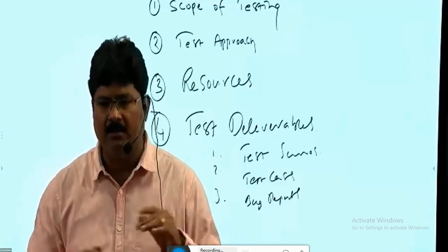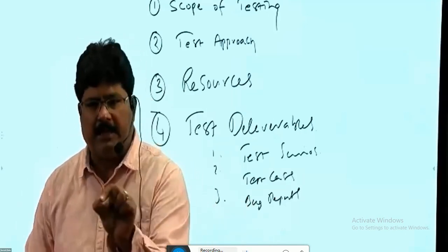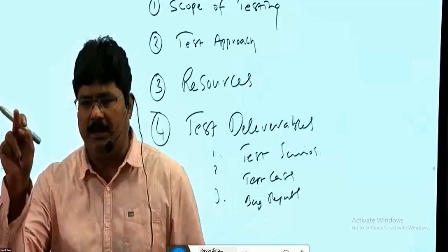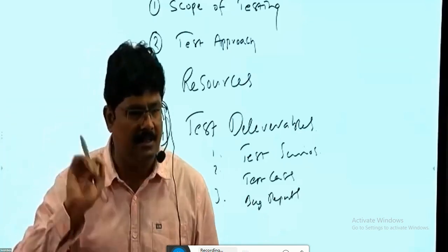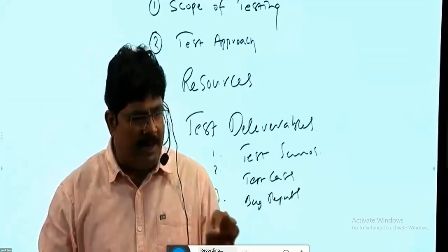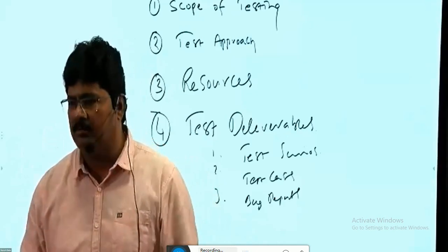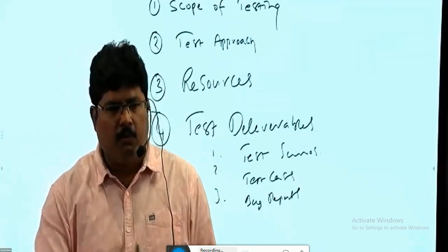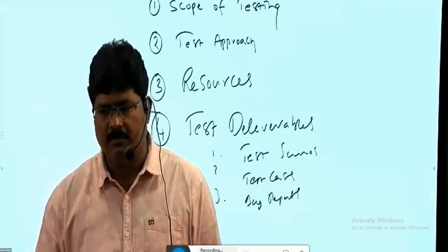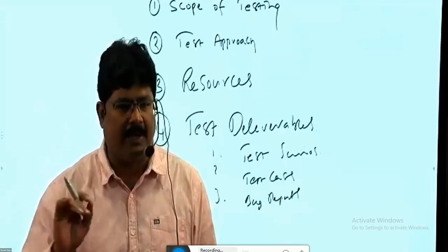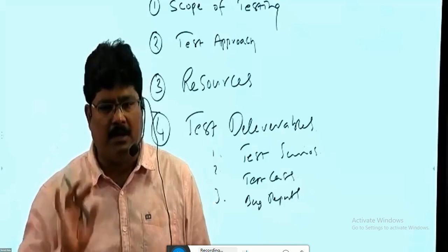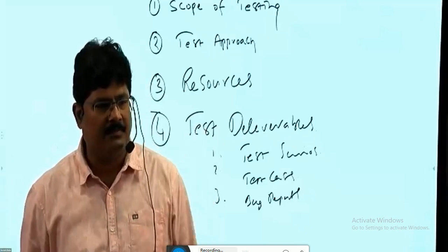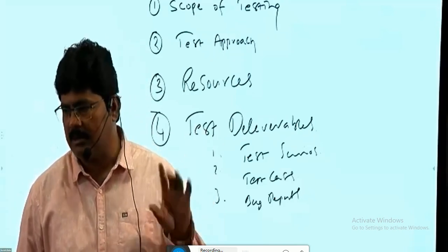This week, we have created test cases for admin module, quantity 40 test cases. We have created test scenarios for admin module, quantity 20 scenarios. 4 people were involved in this work. These many hours of time spent, per hour these many dollars. That is the billing model. Getting what I'm saying?